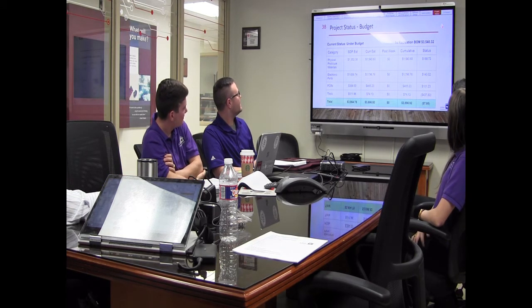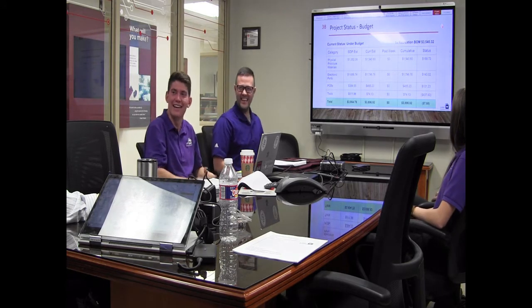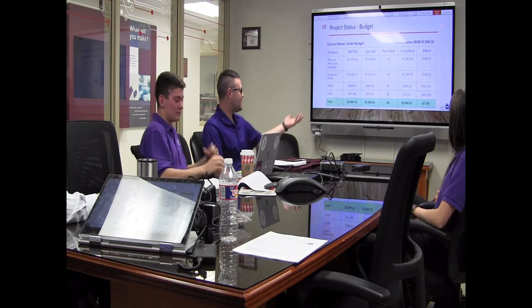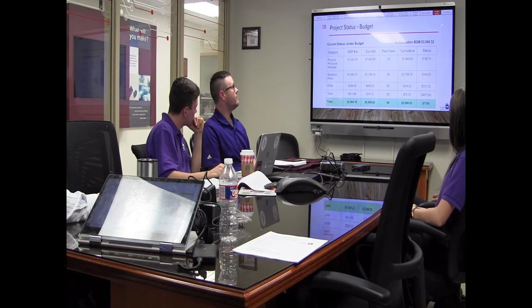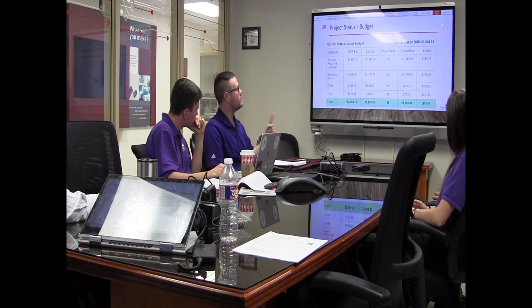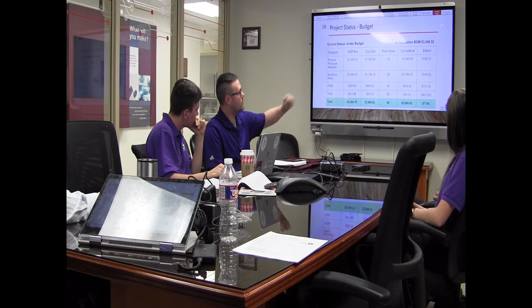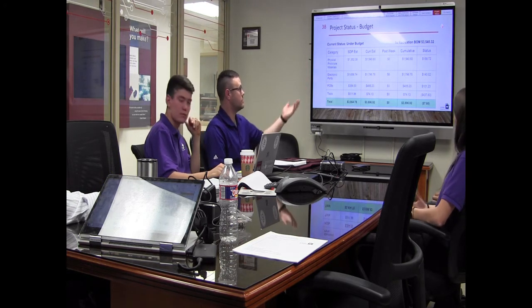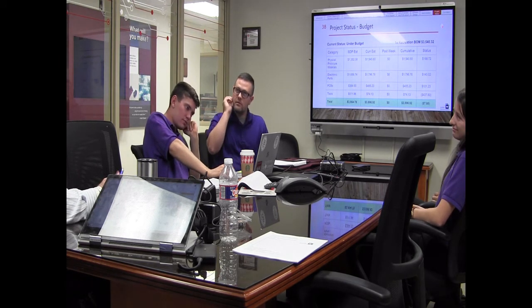Now this is what I want to know, this is the cool one. We are currently $7.86 under budget. Well, at least I didn't go over budget. There you go. Total spend so far is $3,896.92. If you wanted to recreate this one time, it would be about $3,540. I don't think we're going to get major reductions in scale.